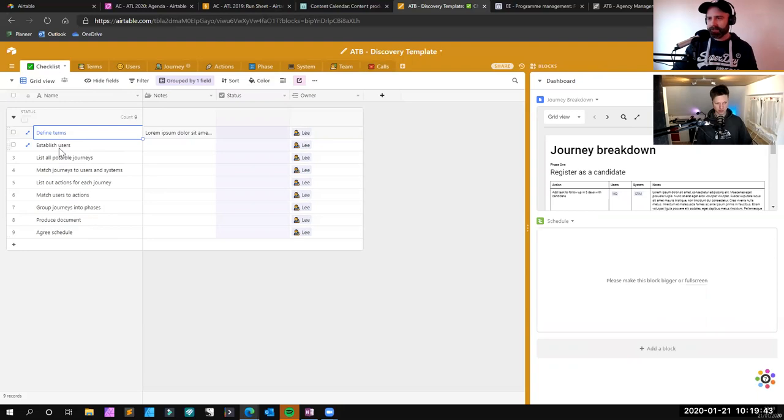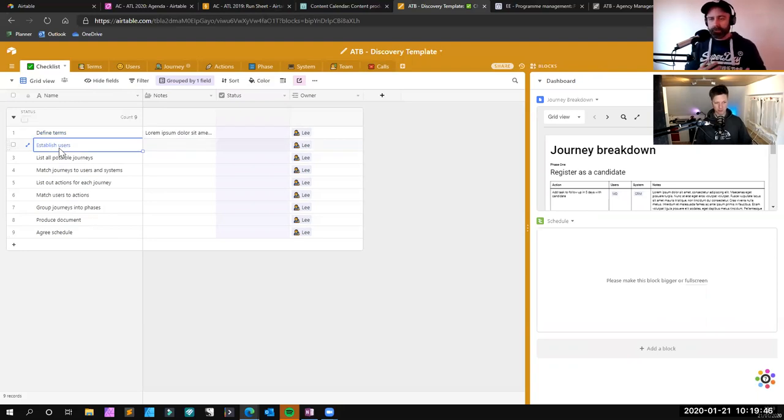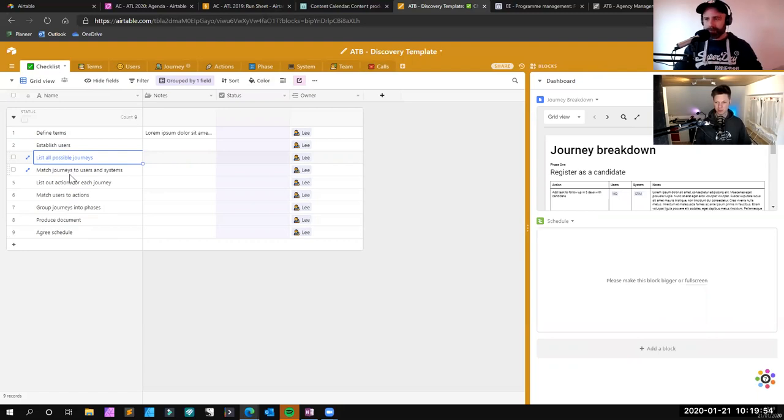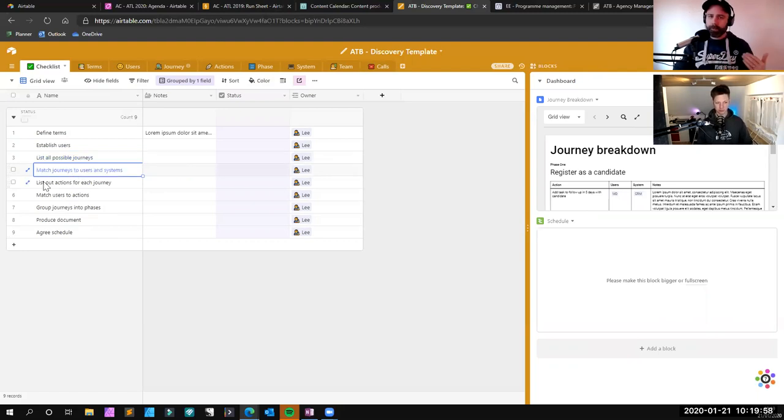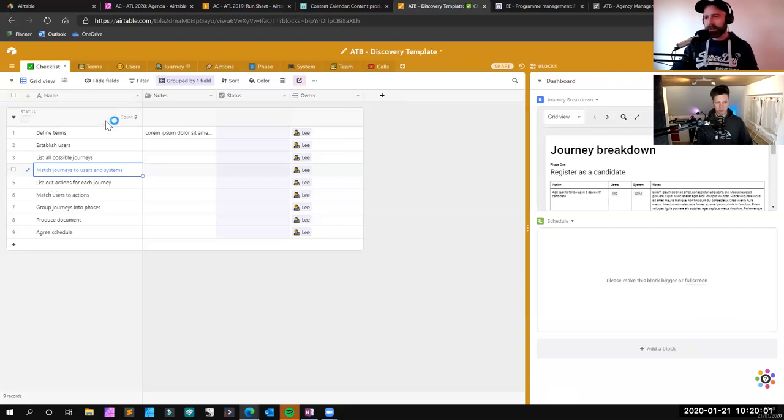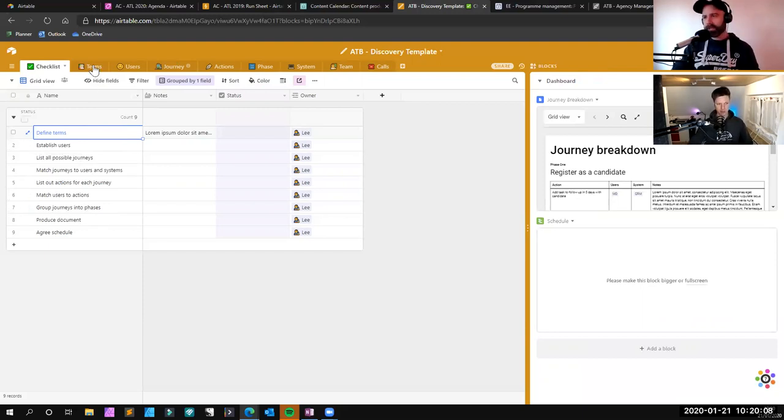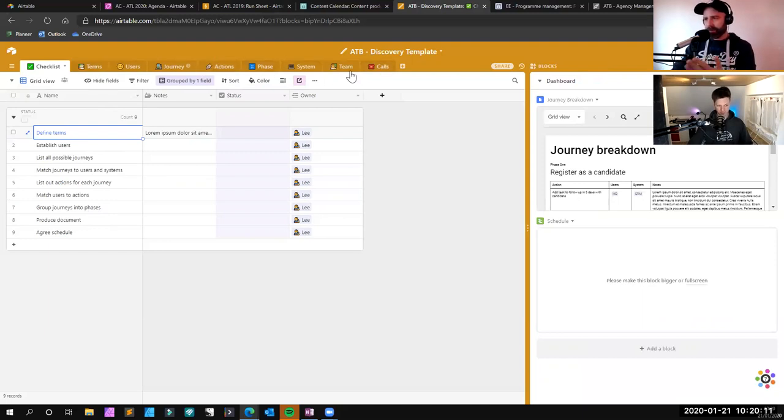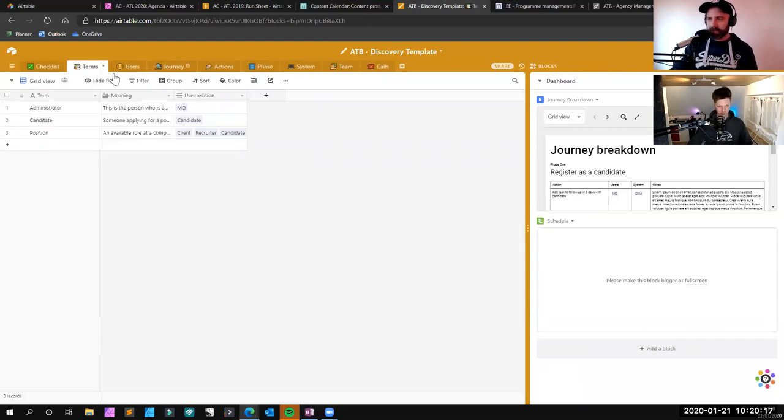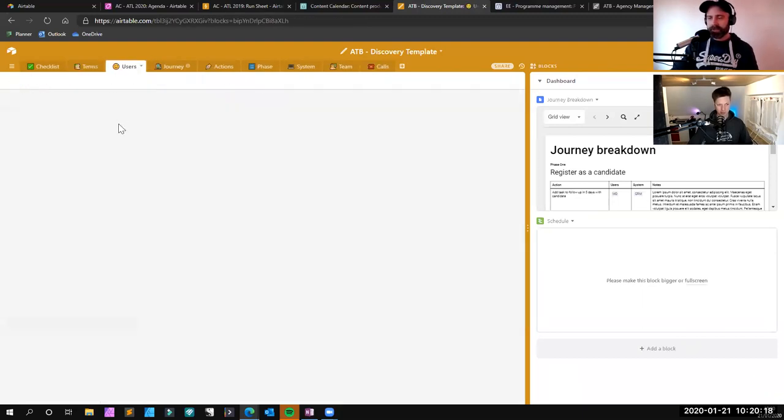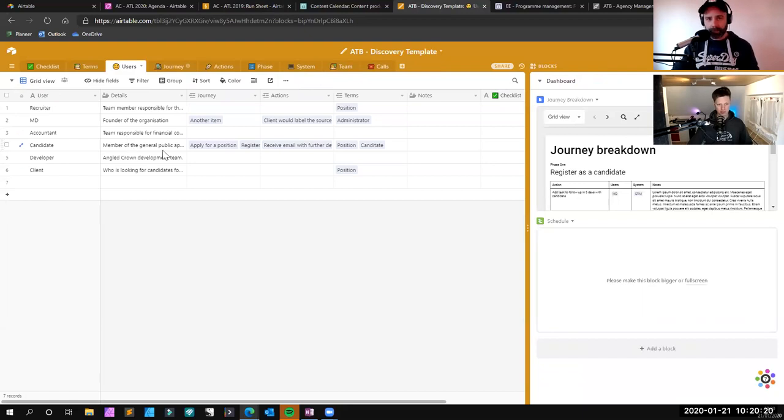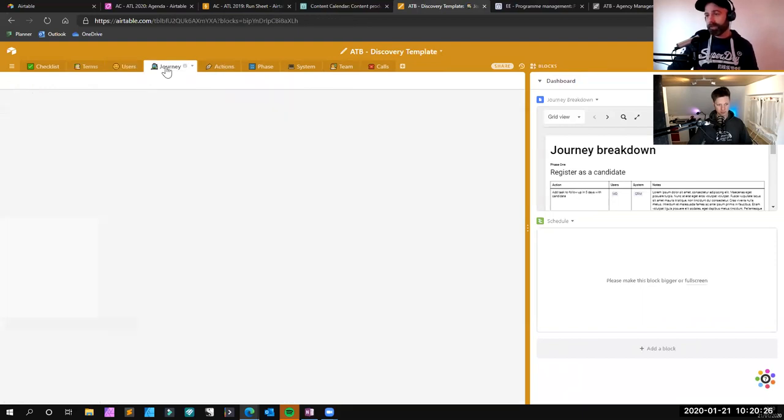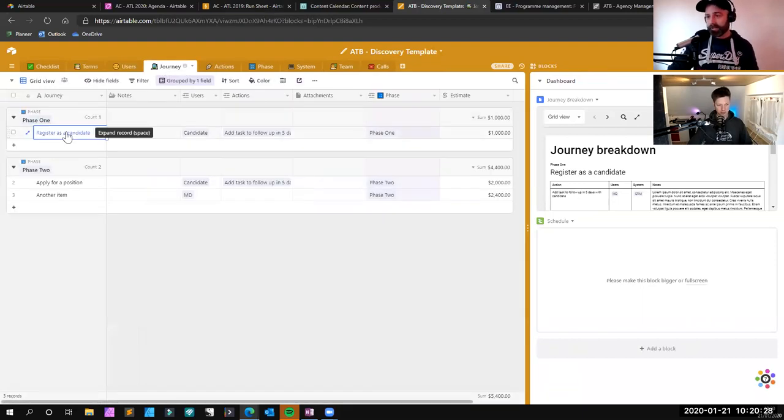So for going through that discovery process with a client and helping them understand how each one of those sections work. So if you see here, we've got this journey breakdown. Let me just talk to you a little bit about our discovery process. What we will do is, and this is our checklist, is we will go through with a client and say, alright, you want a new website building. So first of all, we're going to meet up and we're going to define all the terms that your industry uses. So you see this, we've got our defined terms. Then we're going to establish the users of the platform that they want creating. We're then going to list all of the possible journeys that that user is going to go on.